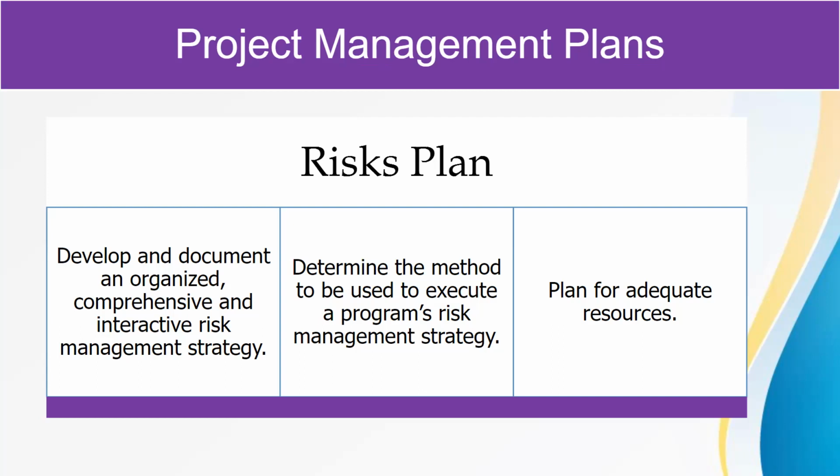So once we have done all of the risk identification and risk analysis, we then do what we call the risk management plan. In the risk management plan, we talk about mitigation strategy. What are we going to do if this happens? What's our response if this happens? What's a fallback position if this happens?